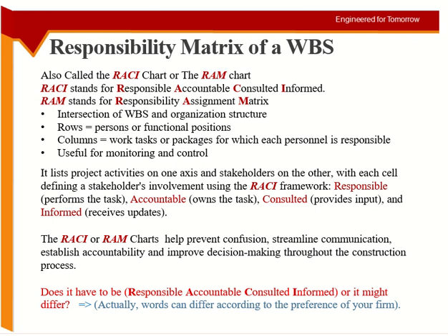Basically we need to have the list of activities which you have in WBS, and for every activity we need to identify the person who will do it, who will approve it, who will check it, and whatnot. Anything else which you need to do in the project. I already mentioned that.